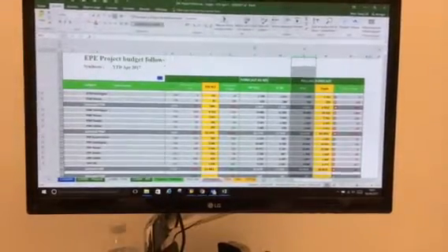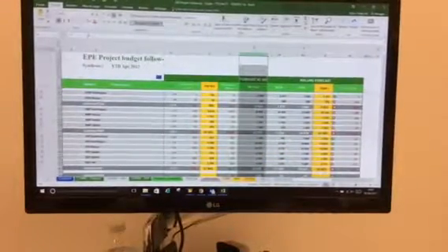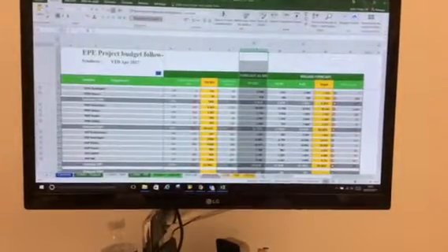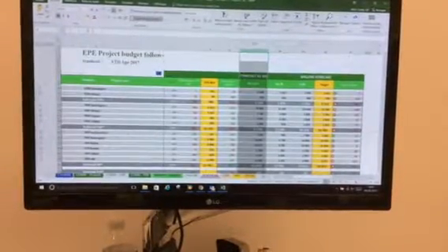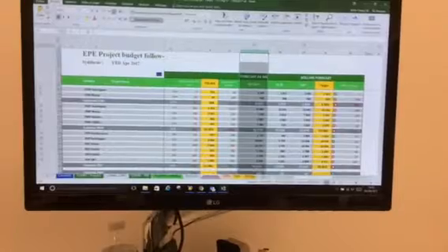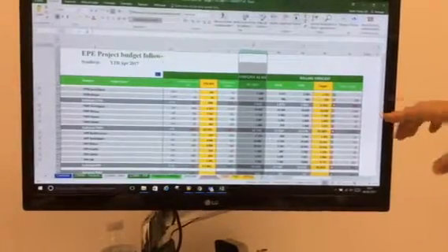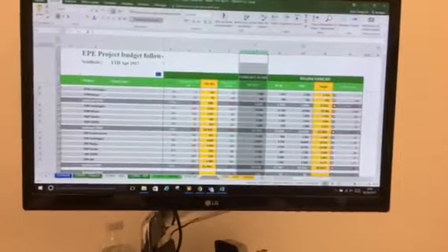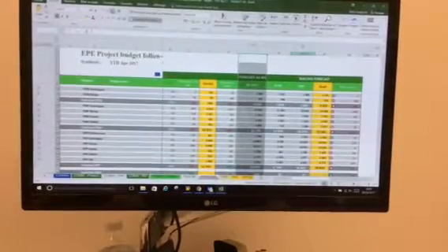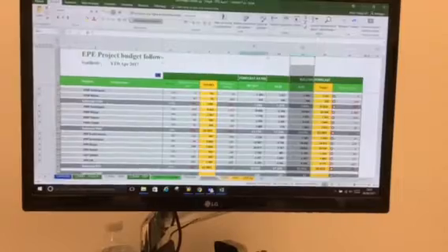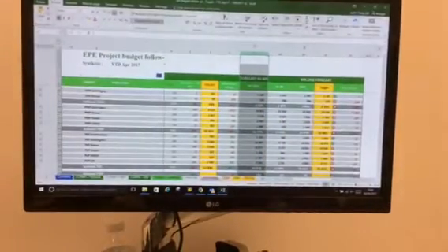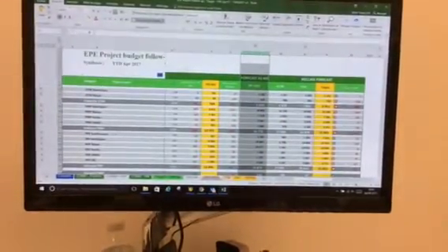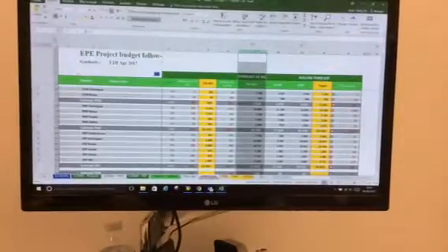Because otherwise, if we take into account only the pure original forecast in MS from January to December, everything would have to be changed. Of course, because if you are, I don't know, 300 over budget, you need to make sure that the rest of the year is 300 under. Yes, that's why we use more or less the full year forecast, but not the original forecast in MS. So more or less it is only that.